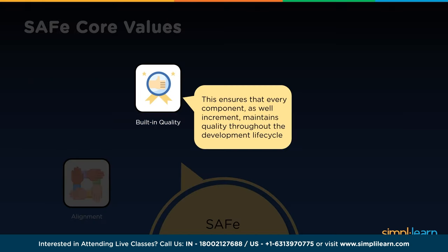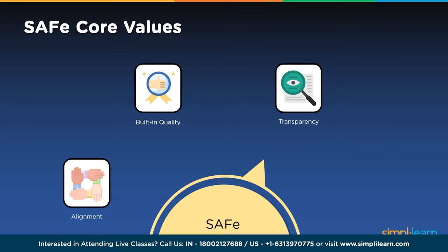Built-in quality ensures that every element and every increment of the solution reflects quality standards throughout the development lifecycle — quality is not added later. Building quality is a prerequisite of lean and flow; without it, the organization will likely operate with large batches of unverified, unvalidated work, leading to excessive rework and slower velocities that prevent quick responses to market dynamics. Transparency enables teams to rely on each other and build trust — wherever trust exists, high performance can happen.